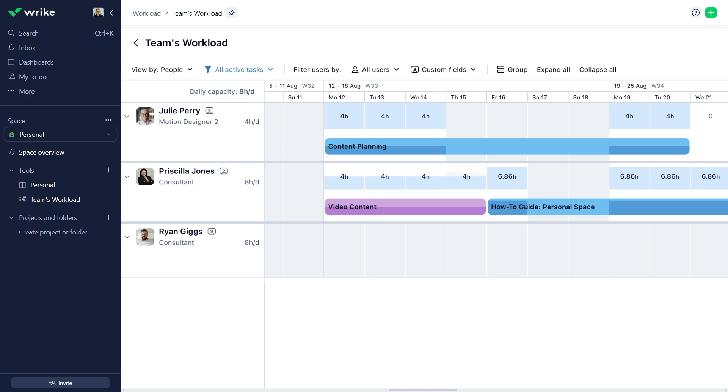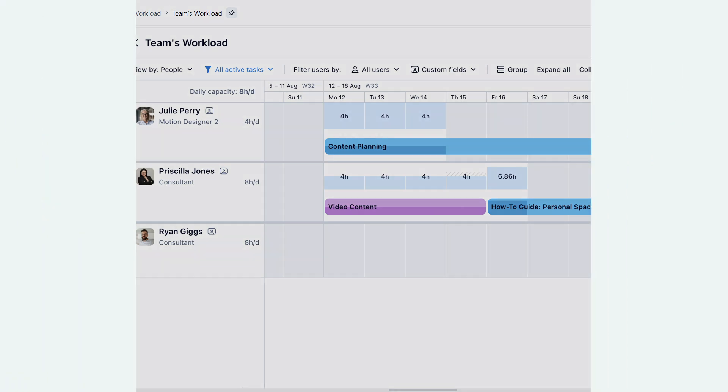Workload charts reflect users' work week, daily capacity, and days off according to the account-wide and personal work schedules, offering visibility, efficient resource management, and transparent communication.